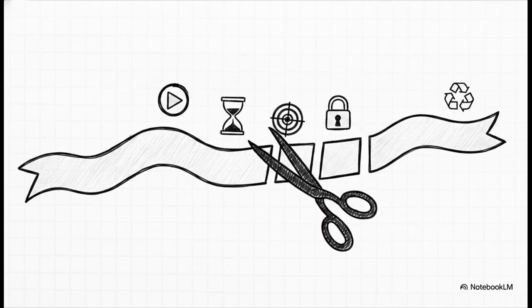Split it when a new objective begins, or honestly, split it if the content is just way too long for one sitting. You also want to create a new topic if a quiz is required before moving on, if a facilitator needs to report on the completion of that specific activity, or if you think you might reuse that exact piece of content somewhere else down the line.